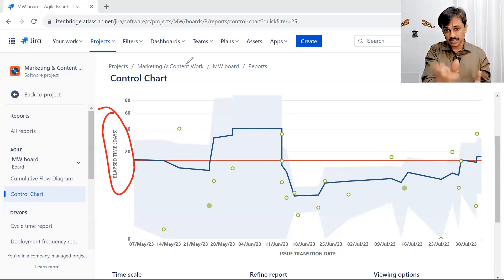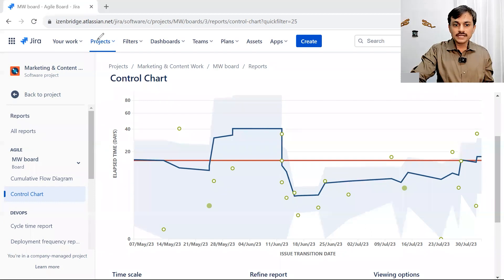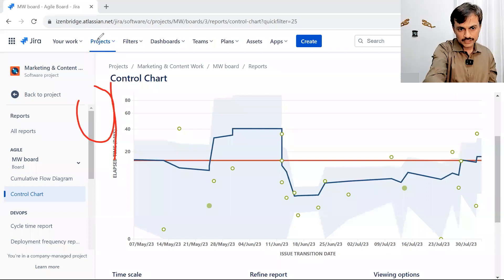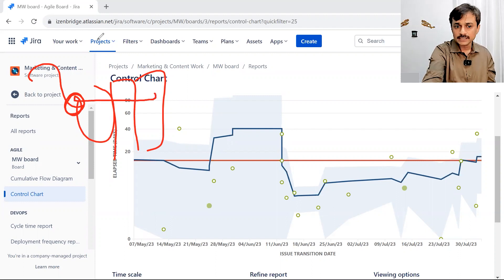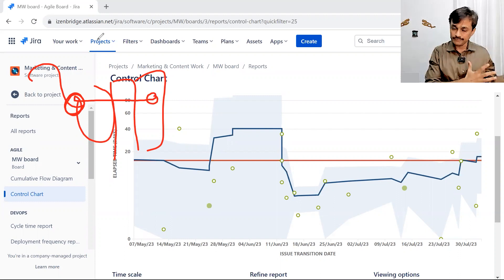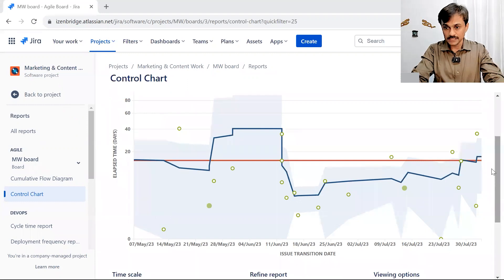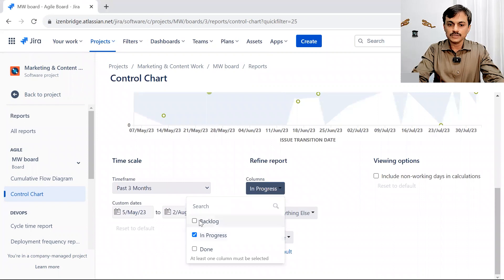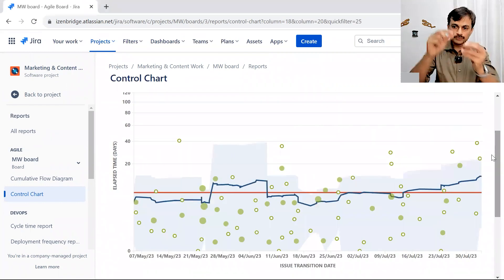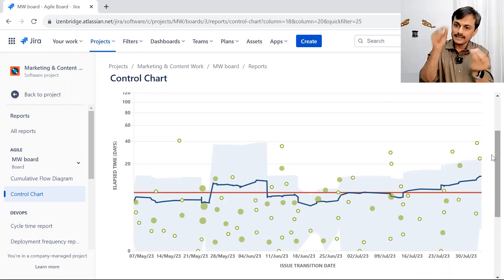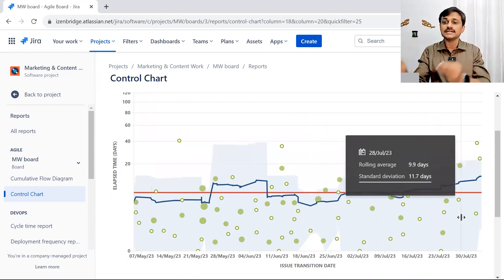How can I convert this into lead time? Lead time is a term we use when we have multiple stages and want to start counting from entry into the first stage all the way through to done — including everything before Done. To do this in the chart, I include the Backlog column. Including Backlog means the time counter starts from the point the issue was added to the Backlog. So the line, average, and numbers now show the Backlog-to-Done stage.